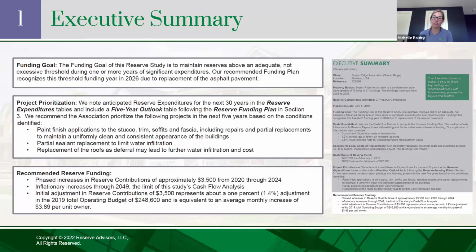There was recent legislation that just passed this year that now gives boards the authority to special assess or take out loans for any critical repairs. So historically, they couldn't do that. It had to be kind of a vote of membership and that sort of thing, where now, if the documents don't specifically mention that they can't do it, they can do it. So if they don't have the reserve funds available and they need to repave their streets or replace their roofs, the association, the board can now take out a loan on the association's behalf for these critical projects. And that is new legislation.